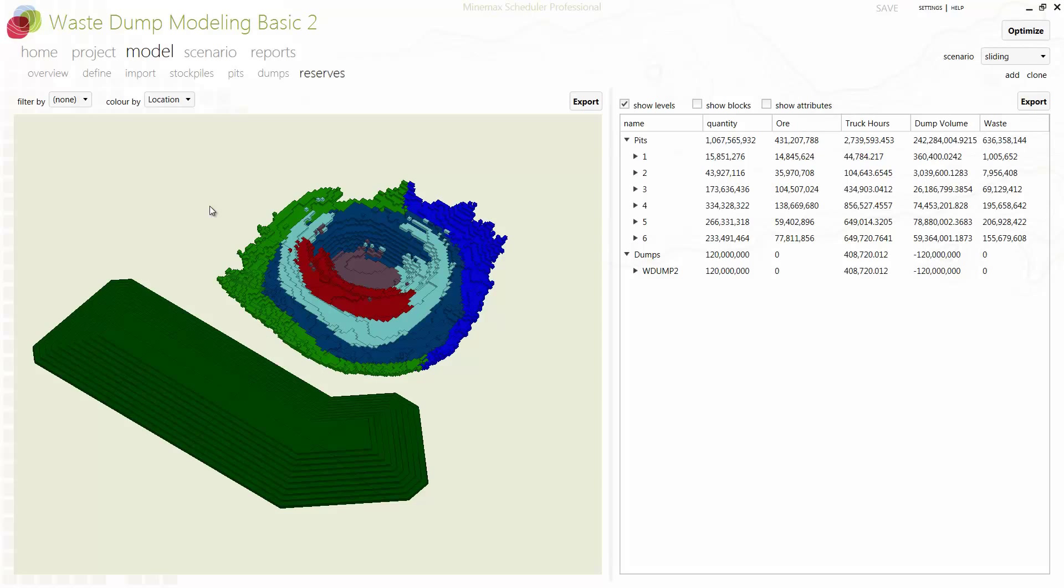Welcome to this short video on Integrated Pit and Waste Dump Schedule Optimization in MineMax Scheduler. Consideration of trucking requirements in mine schedule optimization is of utmost importance. If a mine schedule is not based on an accurate representation of trucking capacity, then the schedule may not be achievable.